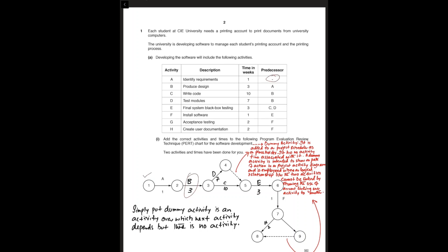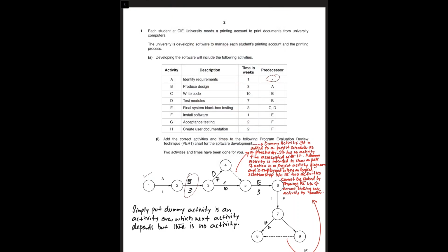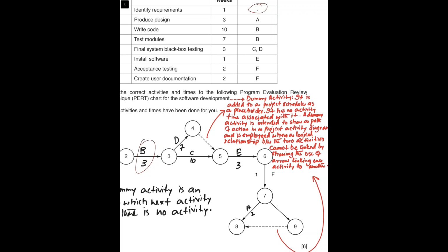Although G and H are starting from E, the point where the whole PERT chart would end is not there. Since there is no end node, in order to finish it, we actually have both G and H finishing with their separate respective nodes.